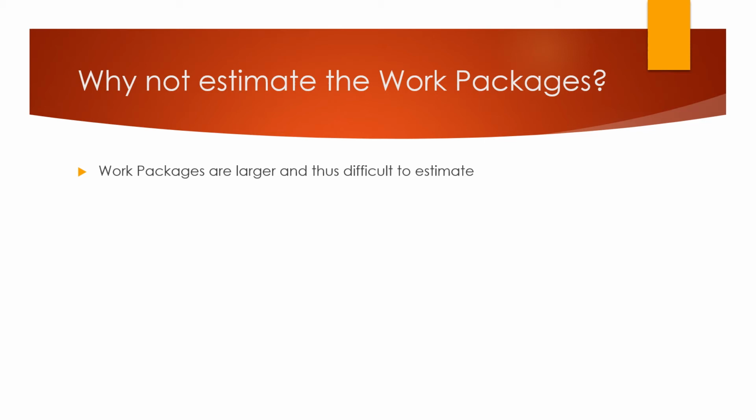It is difficult to estimate a work package, and that is why you divide it into certain activities. Let's say a module of code that you need to complete is a work package. If you divide that into certain activities, you'll find out that you need to coordinate with three different teams, and those three different teams will have certain activities. You can reach out to those teams and come up with an estimate of the time that they would need. And that is the reason why you cannot estimate at the work package level. Rather, you should estimate at the activities level.